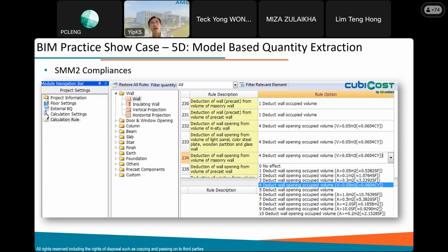So the problem with Revit schedule is Revit can only produce a net quantity. They cannot include all these measurement rules in their quantity. So most of the time, if a QS needs to extract the quantity from a Revit model, he or she needs to be careful, and needs to know the limitations of the quantity from Revit, and they may need to do some manual work to include these SMM rules into their quantity, then only can produce a usable quantity for a quantity surveyor.